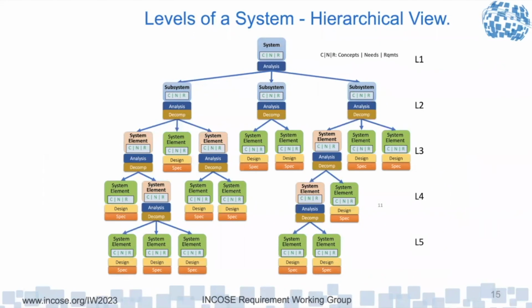So if you decompose at that level, then in the set of requirements that define the end product, it must all start with the end product shall. If there is to be a maintenance manual, then there will be another product, the maintenance manual, which shall. And then there'll be a statement of work requirement on the contractor to develop the maintenance manual. What it does is it forces you to be clear, I think, at that higher level. There's not just the end product. 632 calls these other things enabling products.